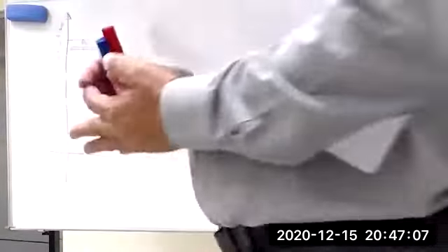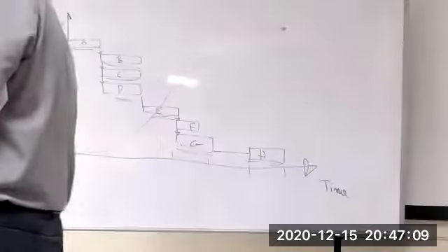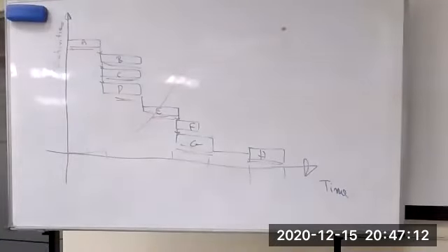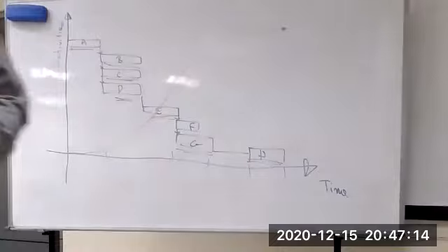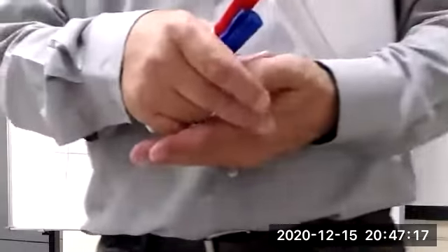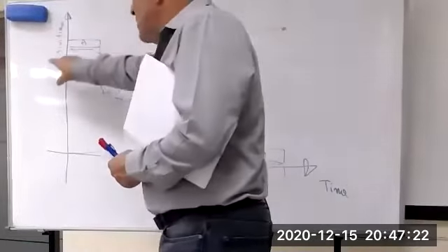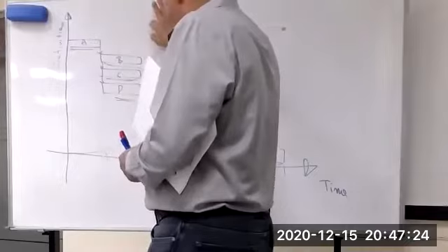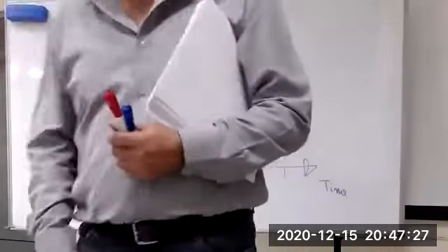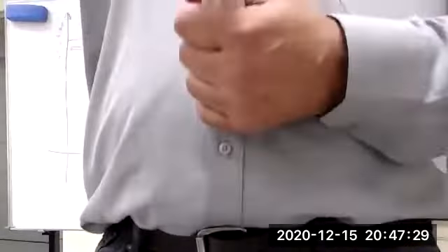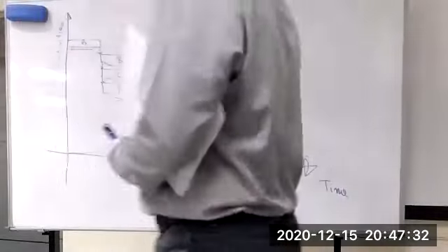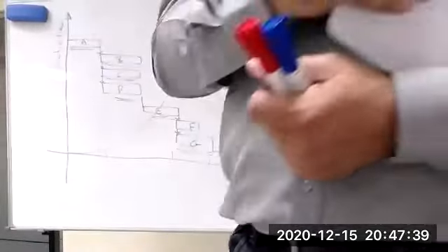You have a recreation building with spa, and sport yards. They tell you that you have to finish buildings A, B, C after 10 months from the start date, the recreation building after 12 months, and the kitchen after 6 months. Now it is a must. We call it a milestone.